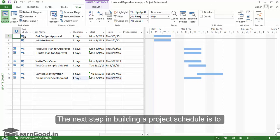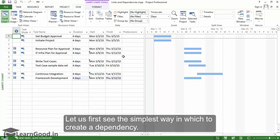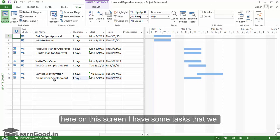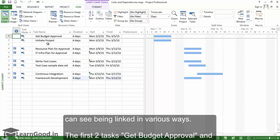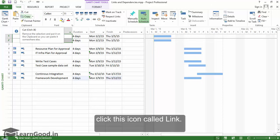The next step in building a project schedule is to create dependencies that reflect your actual project scenarios. Let us first see the simplest way to create a dependency. First, select the tasks to be linked. On this screen, I have some tasks that we can see being linked in various ways. The first two tasks, Get Budget Approval and Initiate Project, are to be linked. I will select them both and on the Task tab in the Schedule section, click the icon called Link.